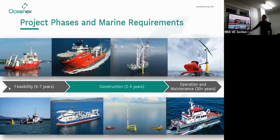So this little towed unit here, a 6-metre buoy with a LiDAR unit on top, so a laser unit that measures the wind speed up to about 300 metres, quite accurately. That was moored at sea for a bit over 2 years to measure the wind resource, because you need proper data on what the wind's doing so you can work through your bankability and actual returns. So that'll happen at all wind farms. They'll need a floating LiDAR unit. Like all wind farms will need geotechnical, geophysical investigations.